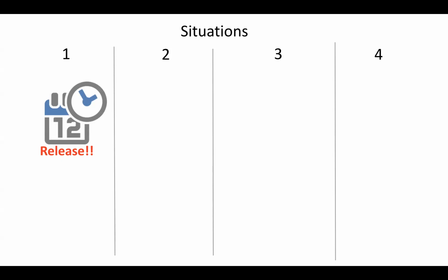So let's talk about other options. One of the options could be that you can count this as an escape defect or a bug. So actually create a bug and send it to the product backlog, where the product owners will go and prioritize it. That is just one of the options.